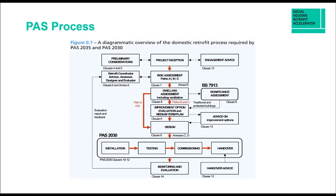The process is well laid out within the PAS2035 document. This flow chart shows the thought process you apply when working to a PAS2035 project. You go through your risk assessment phase, then your dwelling assessment, look at your improvement options, your medium and long-term retrofit plan, evaluate that, and produce a design. At the bottom it covers the installation process, with PAS2030 highlighted in that box. Post-retrofit, it outlines your monitoring and evaluation criteria. It's important to familiarise yourself with this flow chart, because if you don't achieve your intended outcomes, additional monitoring and remedial action will be required.